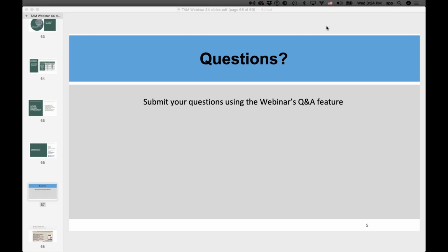A lot of the time it happens that one of the project scopes can be expanded, or some of the projects will be moved because there's some other project planned. Maybe instead of doing a certain maintenance project in year one, there's a mobility project scheduled in year 3. So instead of doing 2 separate projects, those 2 can be combined, so the whole becomes 1 project instead of 2, and the money is spent